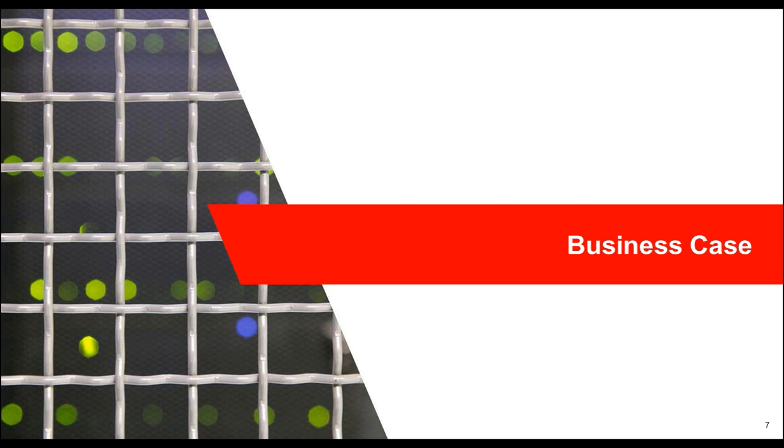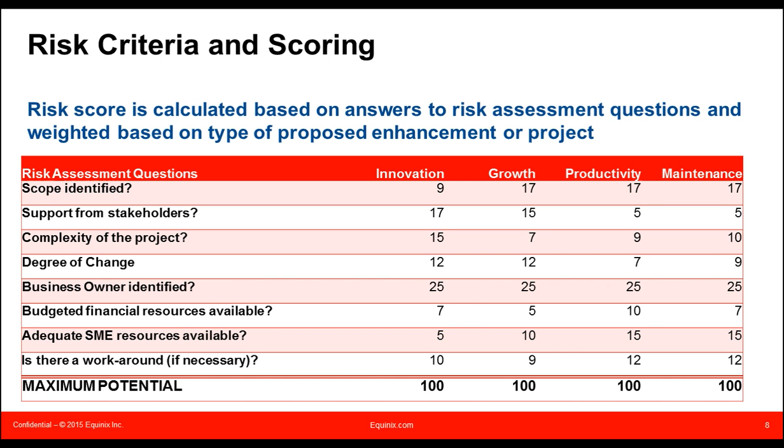We have a business operations team at Equinix that works with each of our cross-functional business teams to prioritize that demand, come up with what that business case looks like, and then we push it through the process to make a decision on which things we actually want to do. So our high-level business process, we have three major phases: request, prioritization, and execution. Execution is really the piece that happens after we follow our entire demand management process. Demand management is focused mostly on request and prioritization.